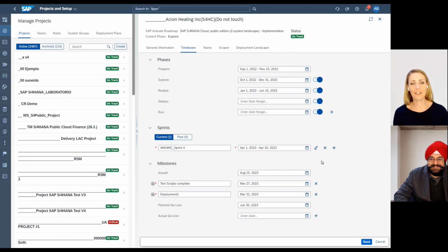Absolutely. That also sounds like it's easy to do. Can I later on switch and change the time boxes? Yeah, sure. So you can change the dates, which is also a common project situation. You can even create overlapping sprints if your teams work in different sprint rhythms. We do not block it. In fact, you can also work with this toggle in which you kind of want to lock the sprint and stop it from accepting more work. So you can also use this switch and you can open and close a sprint.